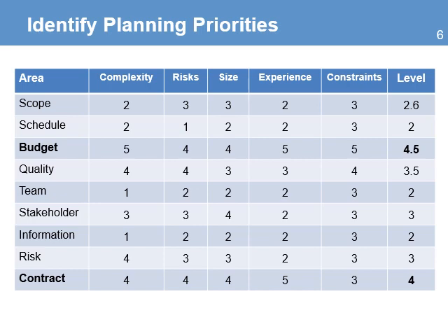The team can rate each area to determine which plan will need more detail. In this example, a simple chart facilitates the ranking of each area with values from 0 to 5. A level 5 means that the plans need to be developed as detailed as possible.